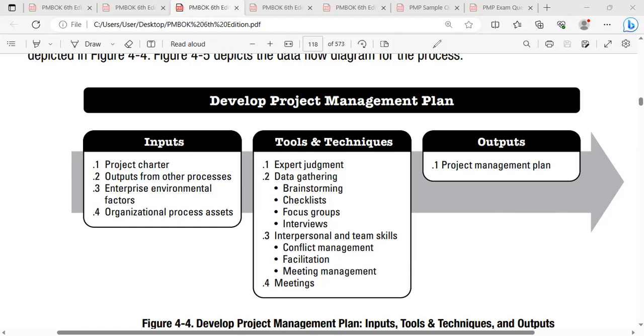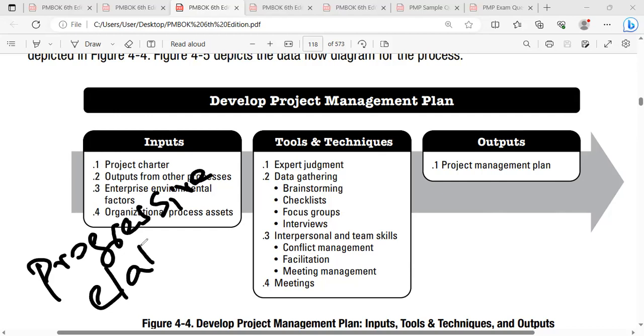Okay. Now, see, actually the technical department is very specific in developing the scope management plan and the requirement management plan, right? So they never send the contribution by the deadline, because they want to do some changes. They never understood the scope at first. Since the project is evolving, they are able to understand in detail. So day by day, they are able to have a better understanding, right? Please note down, this terminology is called progressive elaboration.